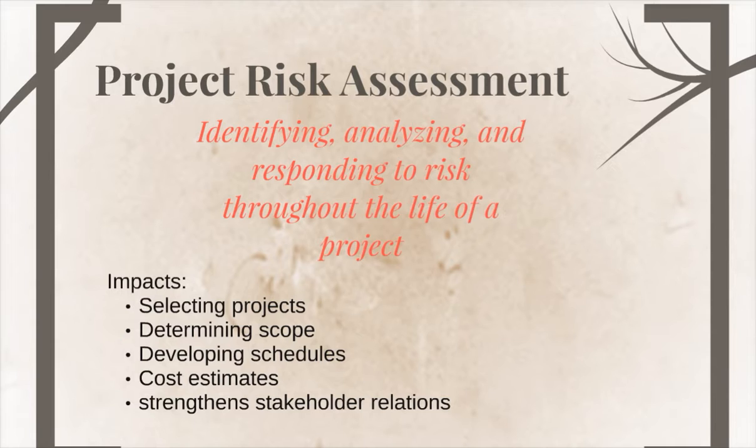I like doing weighting and taking all the risks and all the options and all the cost factors and weighting them to see what the top factors are, and I'll place a numeric value on, most of the time, a good quantitative analysis of it. But I'll use qualitative methods as well by talking to other project managers, talking to other team members that are looking at the projects and evaluating the risks inside of this, and having them categorize everything and weight it themselves.